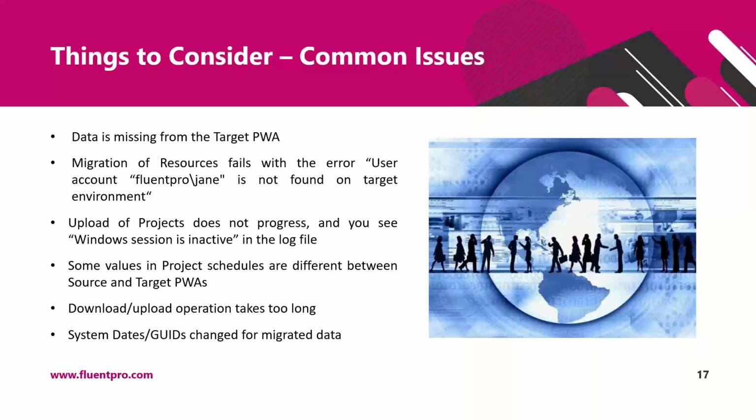The next issue is that publish, download, or upload of projects does not progress, for example, overnight, and you see "Windows session is inactive" in the log file. A Windows session is required to be active at all times when publish, download, or upload of projects is running, because during these processes, FluentBooks interacts with Project Professional, and it is only possible when the session is active. So if the session becomes inactive, the publish, download, or upload process pauses until the session becomes active again.